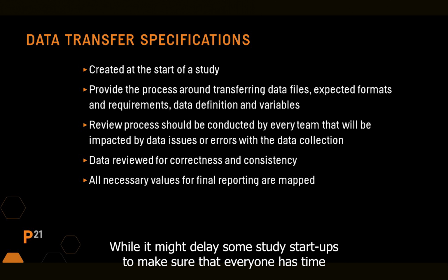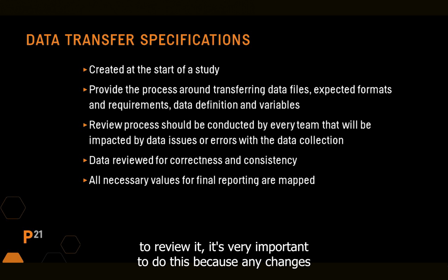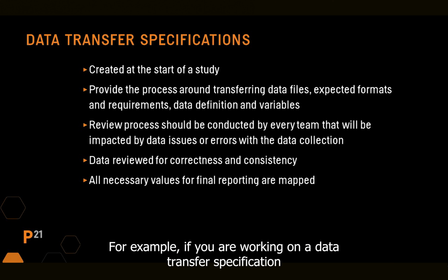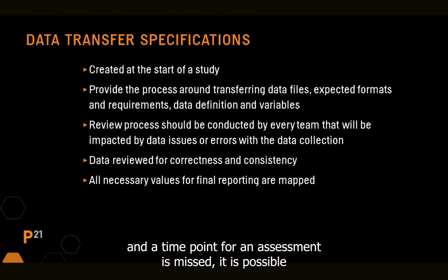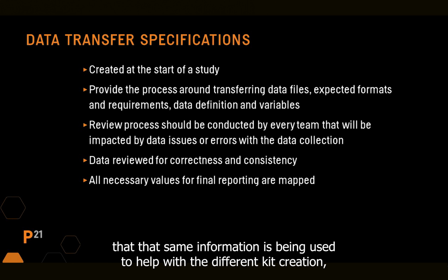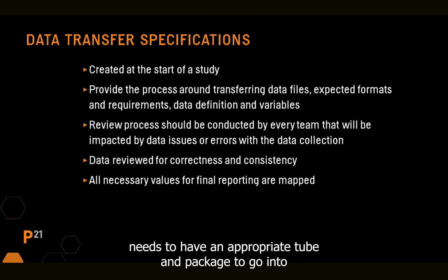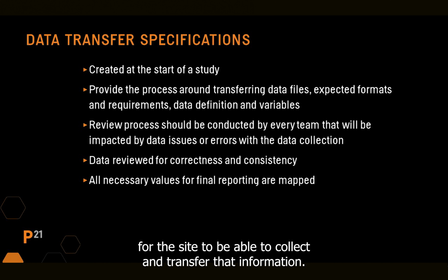While it might delay some study startups to make sure that everyone has time to review it, it's very important to do this, because any changes made early in these stages can cause significant delays. For example, if you are working on a data transfer specification and a time point for an assessment is missed, it is possible that that same information is being used to help with the different kit creation. So each of these biospecimens being captured needs to have an appropriate tube and package to go into and instructions for the site to be able to collect and transfer it.